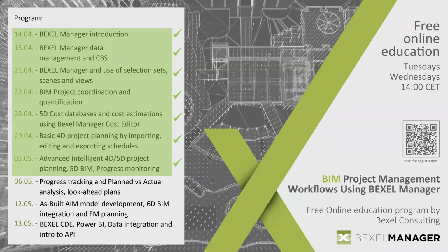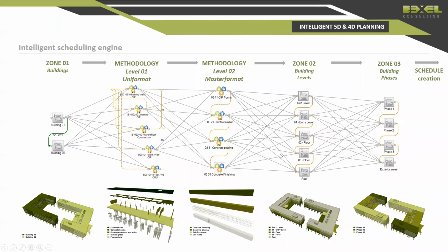Again, I presented how you can create different levels of phases, and in our platform, this is called zones. These are physical representations of different parts of your buildings or different logical groups of your activities on site. And I presented zones for the levels, or actually building stories, which we used for the levels. And we used some physical phases or zones of the buildings. And at the end, I added these two building zones, which are used for two buildings, and how the system actually works.